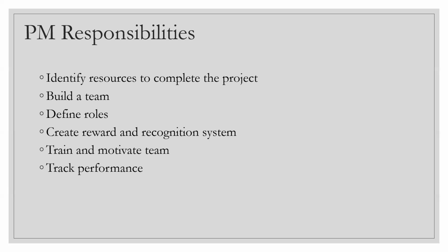And finally, performance tracking. Very important, right? You start a team, you develop a team, you groom the team, and then you give some set tasks to the team, and then you see, okay, how are we doing week on week or month on month? What were the gaps? Did we meet all the planned tasks as per the actual completion of the tasks? Are we going as per the correct velocity or run rate which we planned in the beginning, or is there some flaw there, some lag, or are we even going beyond that? So have a check on all that.